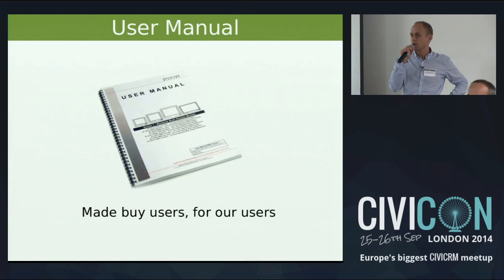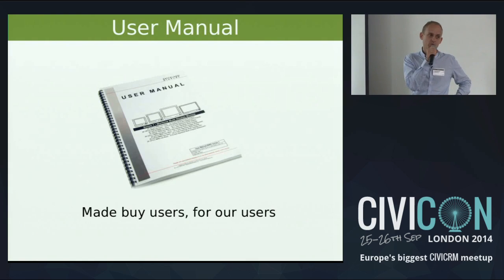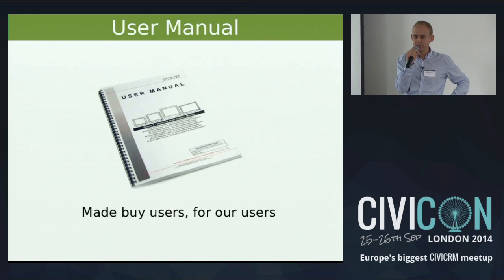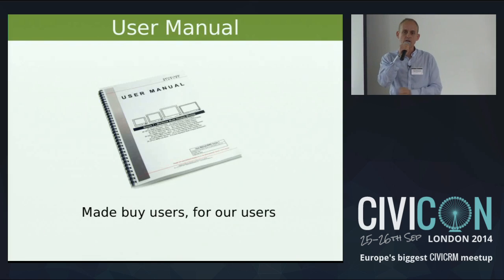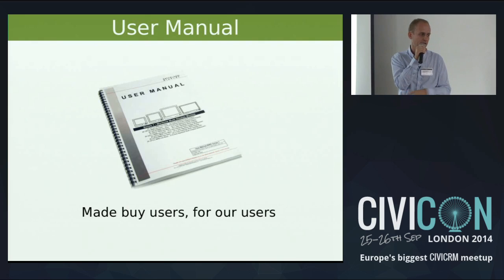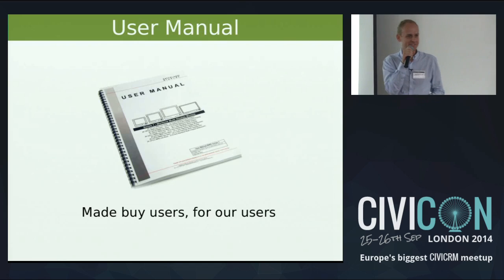We also asked them to write a user manual, and two users volunteered to write it. We thought it would be a good idea to let them do the work because it would improve the acceptance with the other users. I think it was a good decision, because when people were saying, it's not in the manual, it's not in the manual, we said, okay, no problem, just ask Vicky to do it.